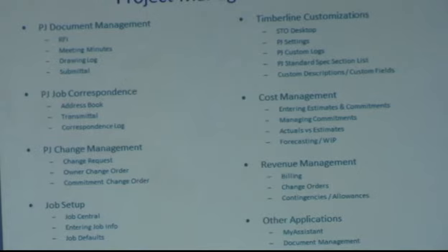And the same thing on the revenue side, you can set up schedule values, you can use security to have a project manager or a project accountant or however you guys do it, go in and fill out the billing form to say this is how much we're going to bill this month, and either print it as a draft to give to your customer or have someone in accounting review it before you actually finalize that and send that over as an accounts receivable.